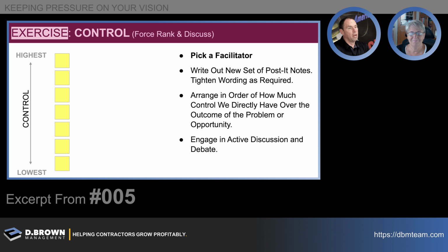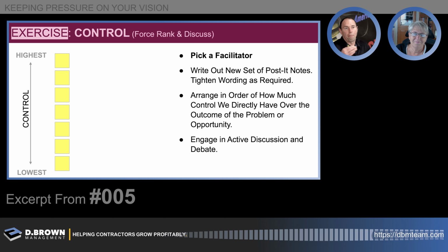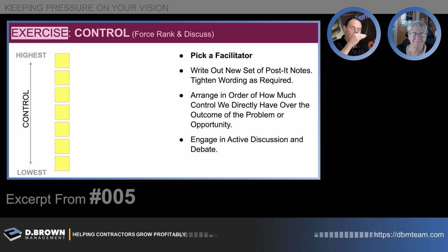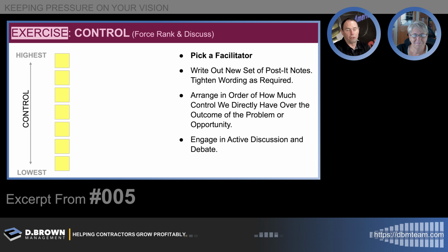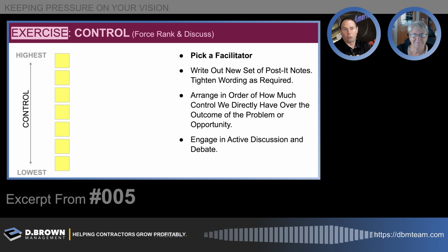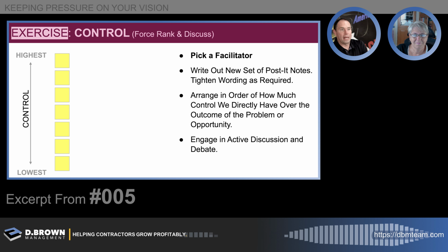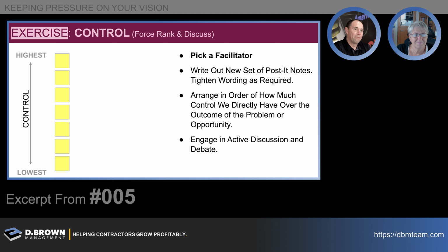Because if you say, I want them to look at every single change order, well, that's not going to happen, probably. Or it might, but it might be that point of diminishing returns. So it's really important to know the cutoffs, like how many changes were over 100,000, how many were over 150,000, and so on. That's the behavior you're looking for, and you're trying to call that out in people. That's where, as a facilitator, you ask, hey, can you look that up? Can you do this? Can you do that? So there's a lot that goes into this piece.